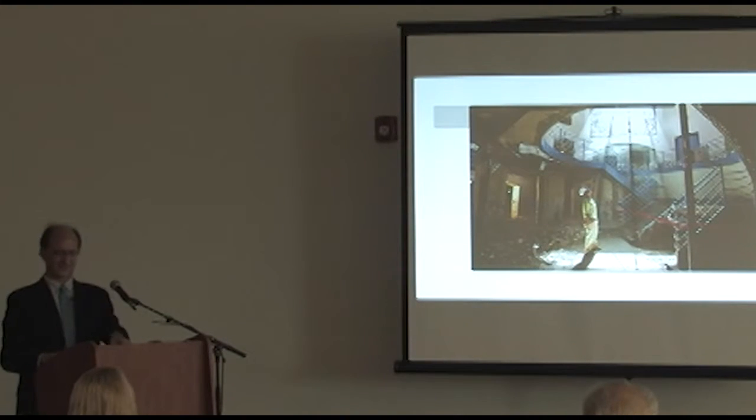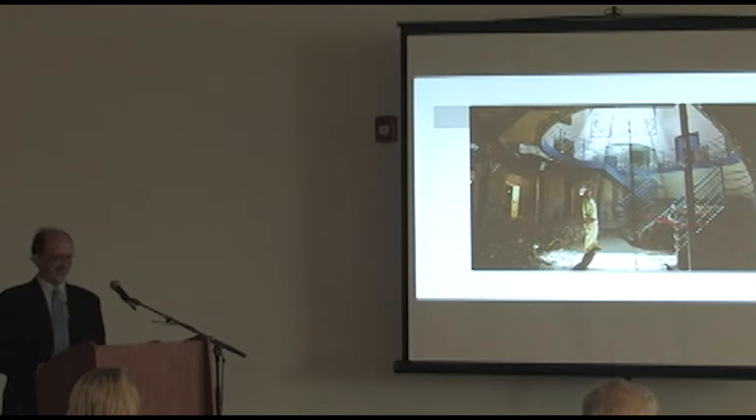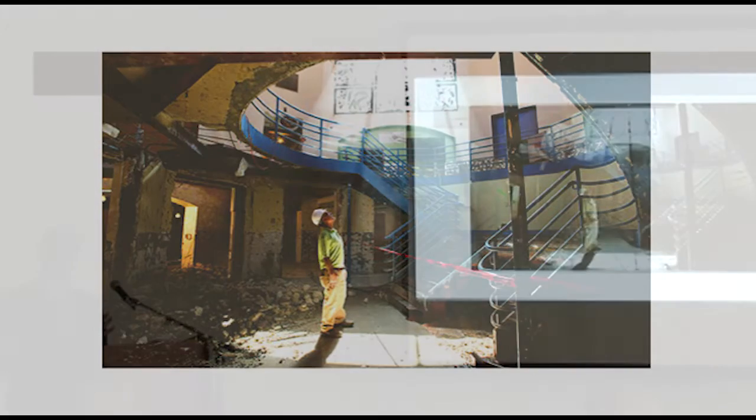Students were eating lunch around 3 times a day, and they don't even know this is happening. Well, they know about the vibration, and every now and then they'll hear a jackhammer. But they built all these temporary walls, and part of the reason that phasing kind of wrapped around the building, and the reason we had to build the first new addition in the initial phase, was so we get some vertical circulation, a new elevator, and then each phase kind of glommed onto that, so it's to circulate in that area while we built walls to isolate them from the active construction zone.